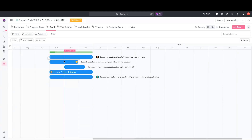Just by dragging and dropping, we've created a blocking dependency between these two tasks, where this 'encourage customer loyalty' objective is waiting on the 'launch a customer rewards program' key target to be completed before it can be completed.